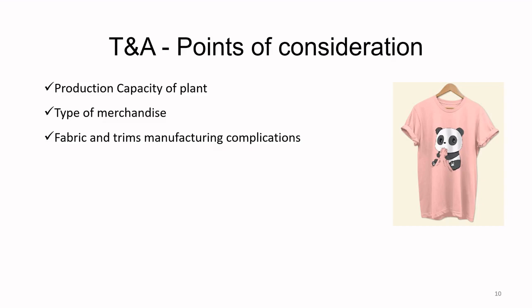And if you want to take the order, you will have to accept those. So once you have taken the order, you will also have to source those fabrics and trims. And the new fabrics and trims might come with their own complications. So if there are complications, you will have to include buffers in your time and action calendar so that you are able to meet the deadline.